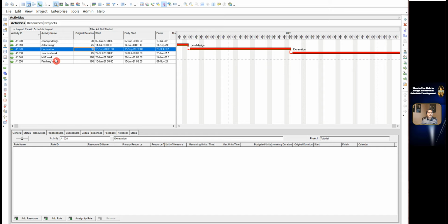There is an activity of excavation that needs to be completed by an excavation crew. In the planning stage, we do not know the specific resource, but we know the limit that a company can only provide you a crew of 6 persons per day in full time.